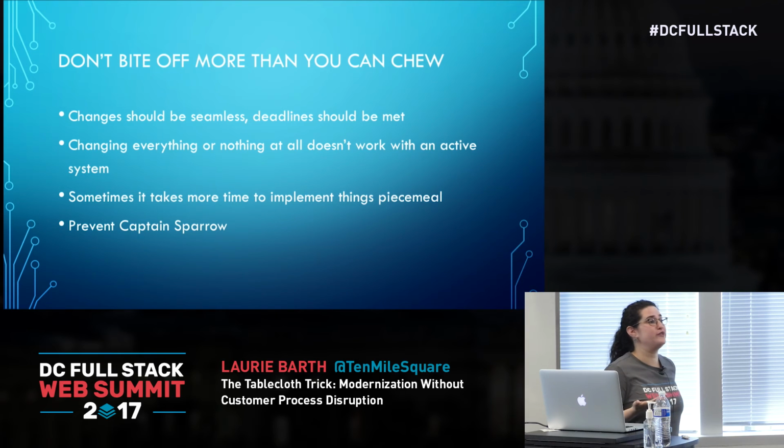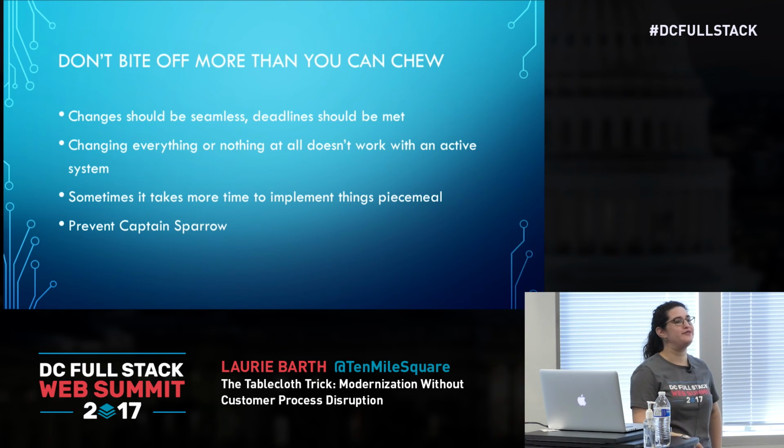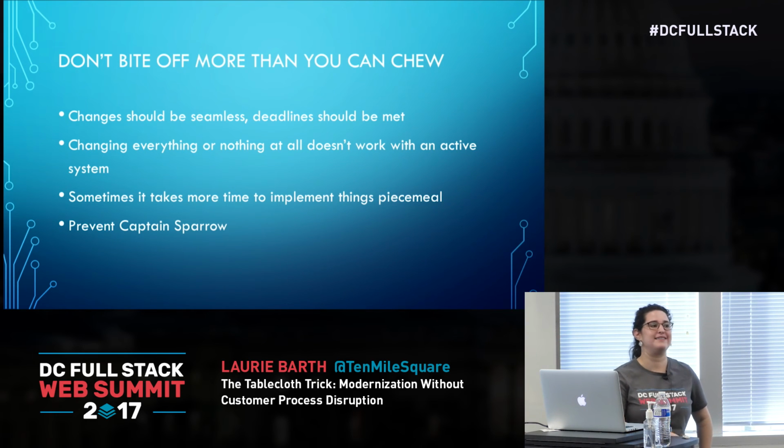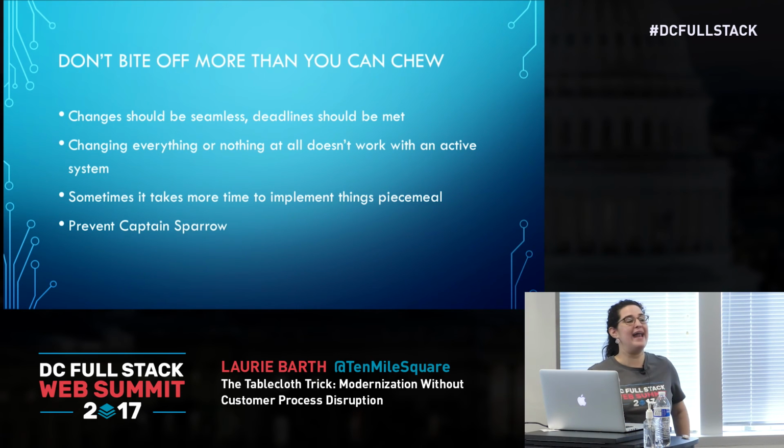And don't bite off more than you can chew. So there's always a deadline. You literally cannot avoid them. And if you're upgrading a larger system, do it piecemeal, make it backwards compatible. It's preferable in almost every scenario. And it doesn't do you any good to follow everything I've said for the last 17, 18 minutes or so and not have a working system when you need one. It literally defeats the purpose.